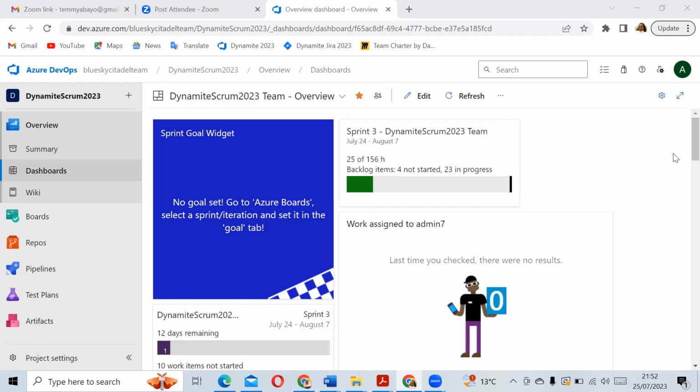So that has to do with all the teams coming together to look at it. Yours is to flag it up, and theirs is to either reduce the hours because they're just getting used to it, so maybe they are overestimating the task, or like I said, you have too much story on the board, more than your capacity to work on for the 2 weeks.